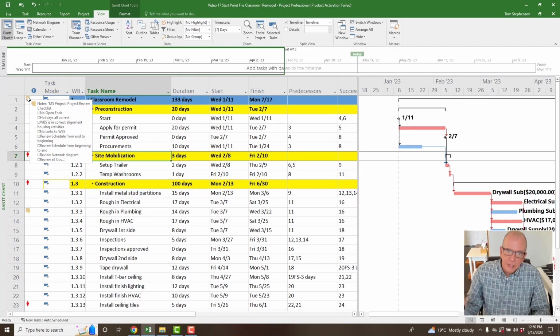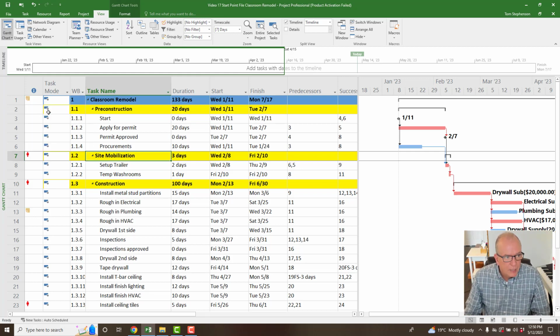Usually when you develop the schedule, it's from the beginning to the end, but you go from the end to the beginning. In lean construction methodologies, we do something called pull planning, and we start from the end of a milestone and work our way backwards. So there's a lot of logic and good information in doing it that way.